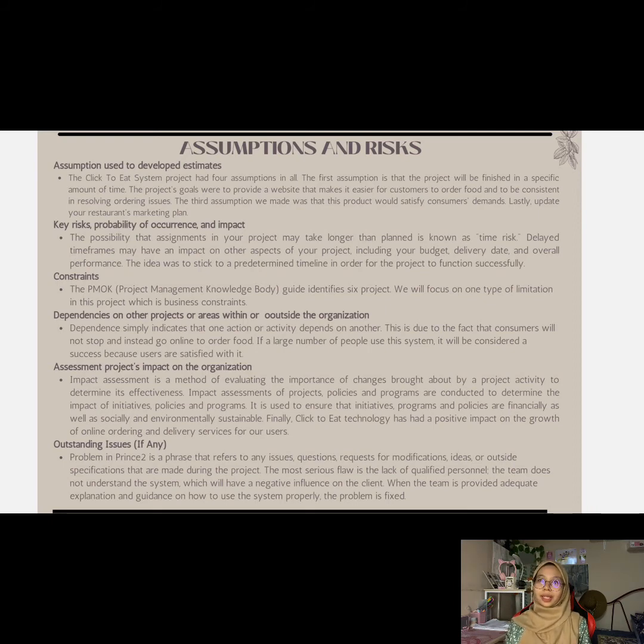3 to 5 months is an appropriate amount of time to build this system. This is to confirm that our system services are well implemented, free and ready to use. The cost required to develop the system will operate within budget. If we want to reduce project cost, we either need to reduce the scope or increase the duration.